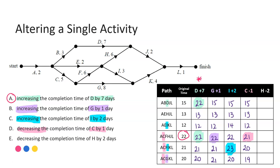Option D: decreasing C by one — subtracting one from any pathway containing C. Three paths are affected. All other paths stay the same. The maximum value there is 21 — only one critical path. Option E: decreasing H by two — H minus two. Paths containing H get the subtraction: second path 13 minus two gives 11; fourth path 22 minus two gives 20. Remaining paths stay the same. Our highest number is 21 — a new critical path, but no second path, it's still on its own. Therefore, we can be really confident that A is our best answer: increasing the completion time of D by seven days will give us two critical paths.